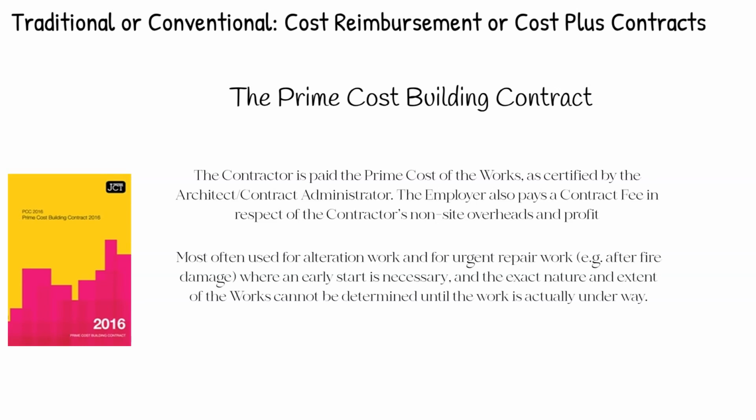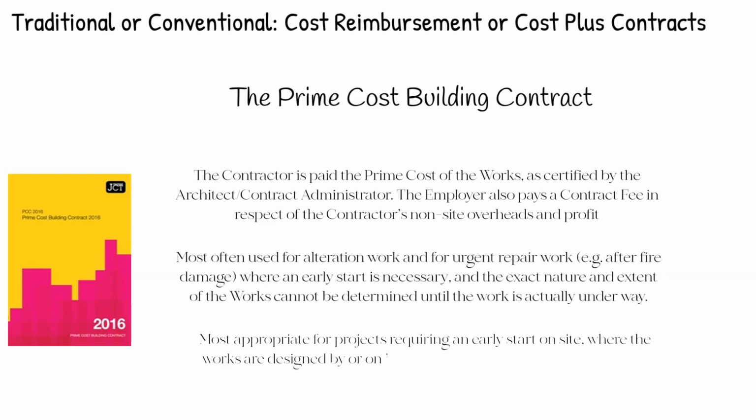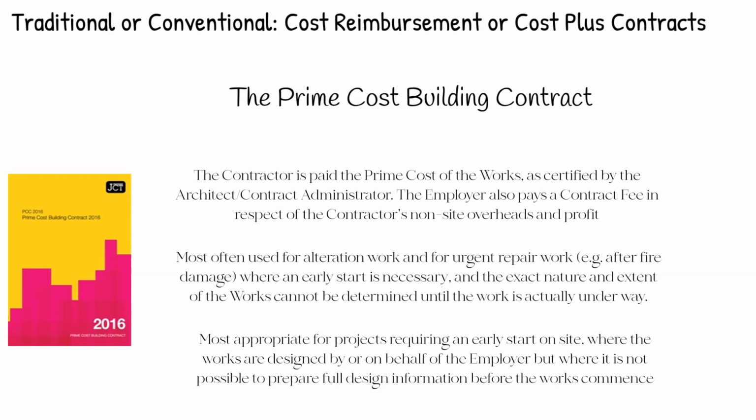This contract is most appropriate for projects requiring an early start on site, where the works are designed by or on behalf of the employer, but where it's not possible to prepare full design information before the works commence. For an explanation on the JCT procurement route,